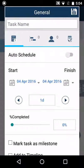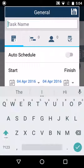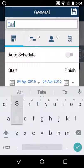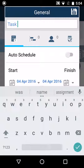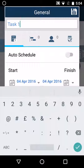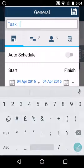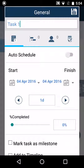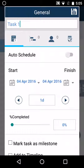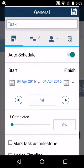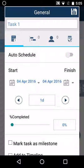It will now ask you to add tasks. Let us add the first task. Now the tasks that you add can be scheduled manually and automatically. To schedule them automatically, turn on the auto schedule mode. Turn it off for manually scheduling them.